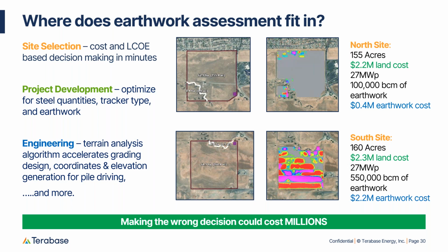We want to start to think about earthwork assessment similar to running an energy model. So we believe that running earthwork models should occur at every stage of the project from site selection onward. Obviously the input data into those earthwork models may be more limited in the earlier stages, but we still believe that doing that can help inform other project decisions and avoid surprises down the road.